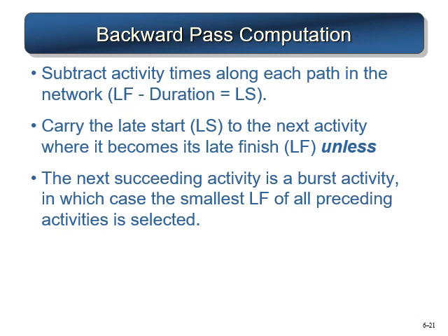So the late finish minus duration will give you the late start. The late start is carried over to the preceding activity, which becomes the late finish. For a burst activity, the smallest late finish of all the succeeding activities is selected.